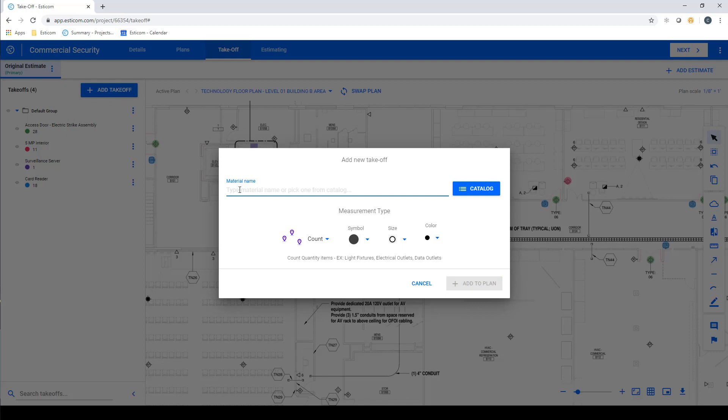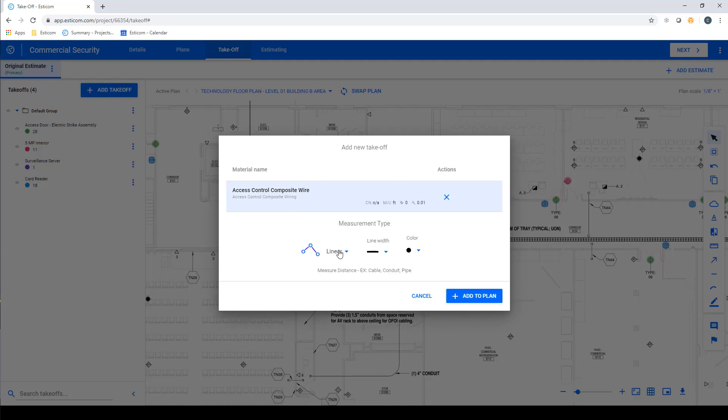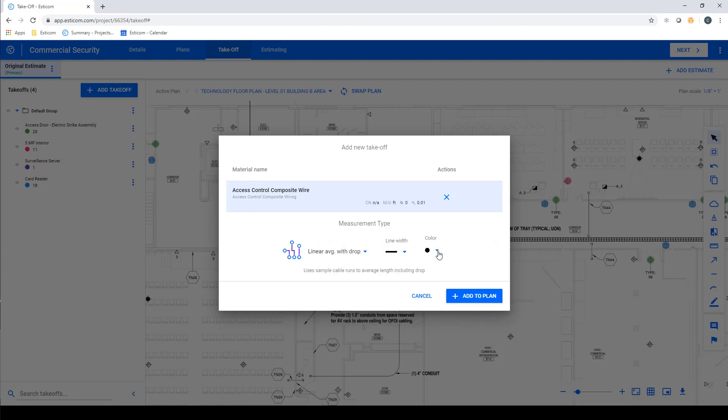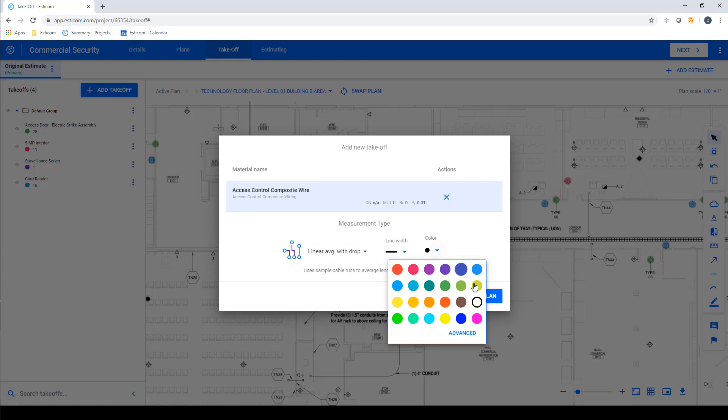SDCom has a couple of takeoff types that are built specifically for low voltage contractors. One of which is the linear with average takeoff type, which allows us to take sample measurements, add a drop distance, and multiply it by the number of devices to get our total cable footage.